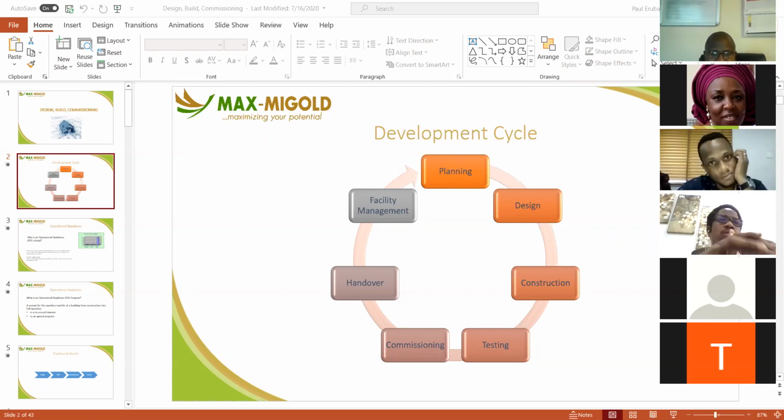For example, I can look at the drawing, I can look at the bill of quantities and say, I hope this captures development of our as-built drawings, which is one of the things I have in those lists that I must request for, right? And he says, oh, the drawing is not here, or I don't have enough of this drawing. You now go back to the owner and say, please, that contract needs to be revised. There must be a line item for as-built drawing, because I, as an FM, must get as-built drawings. All right? Right.